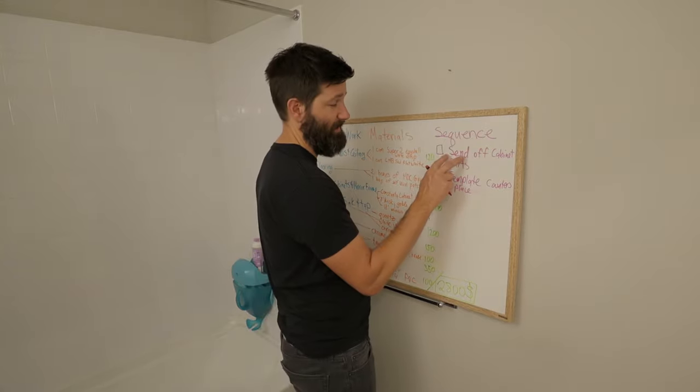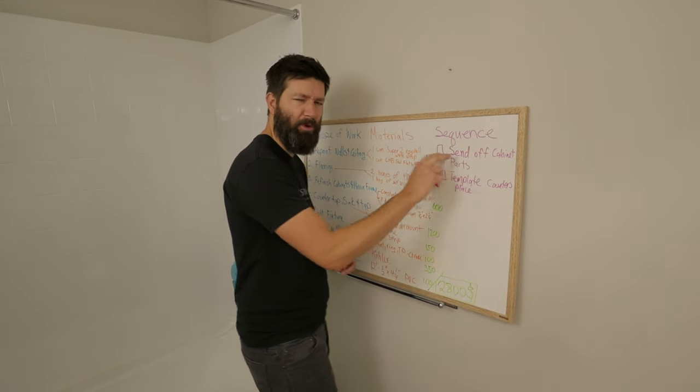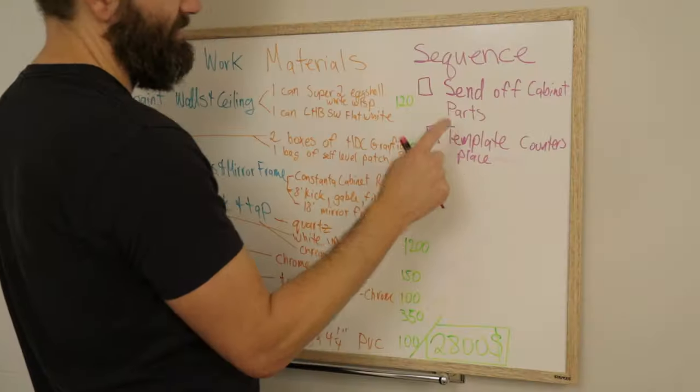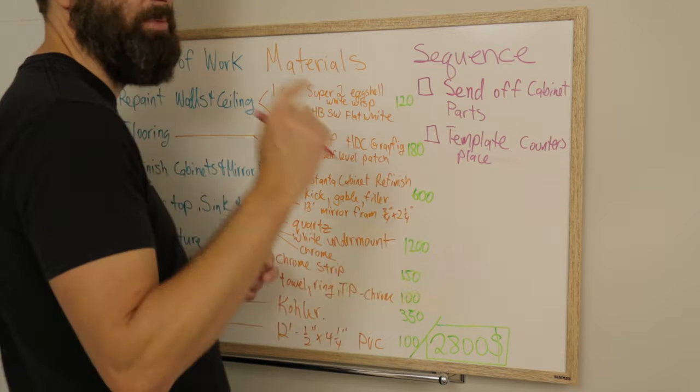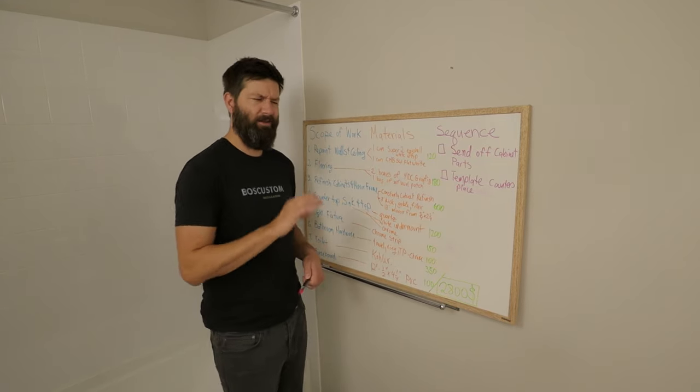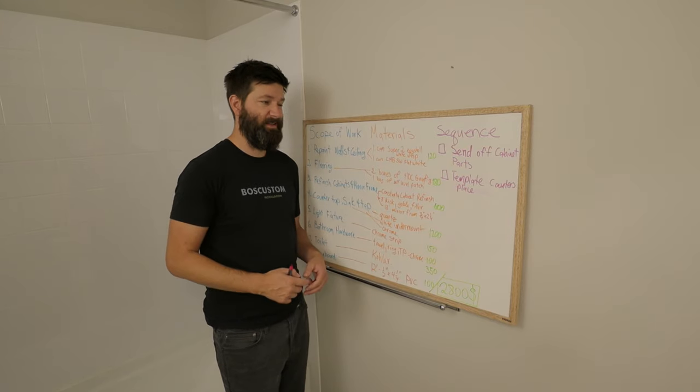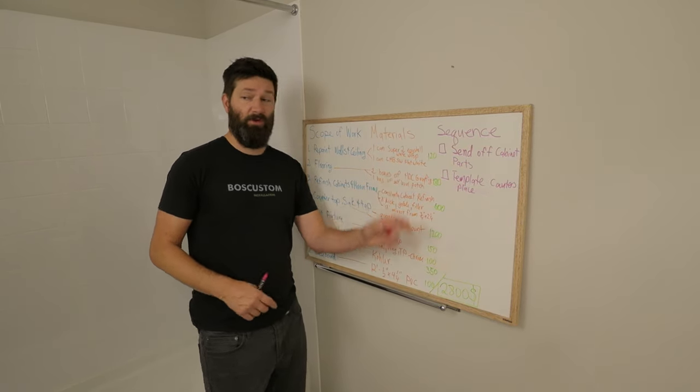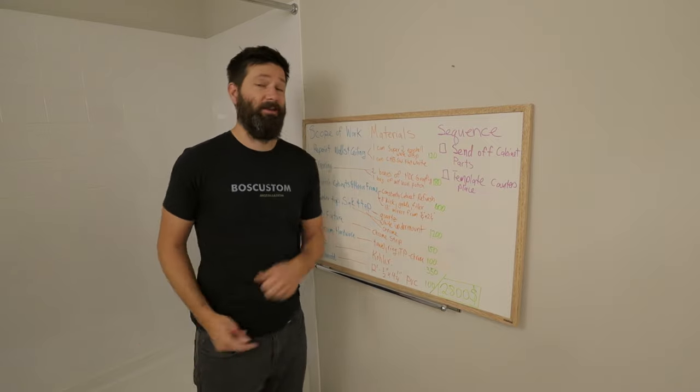Then the next thing up along the same lines as sending the cabinet parts in to get refinished is I'm going to template the countertops and place the order. That way, again, usually countertops take like a week or two weeks. Even if I get the countertop early, I can just put it in the hallway and it's good to go.